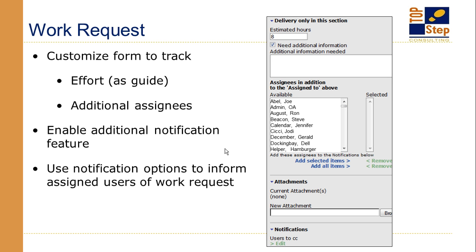And then there was a sort of revision tracking thing. There were departments involved, keeping track of what department owned this, so they could run reports and pull information just for their group. And then there was revision tracking. If they had put in a request for work, but then had to make adjustments to that, they would come in and check revision 1, and add what the change was, what the new set of hours is, and what the new due date is, just to keep track that things change.